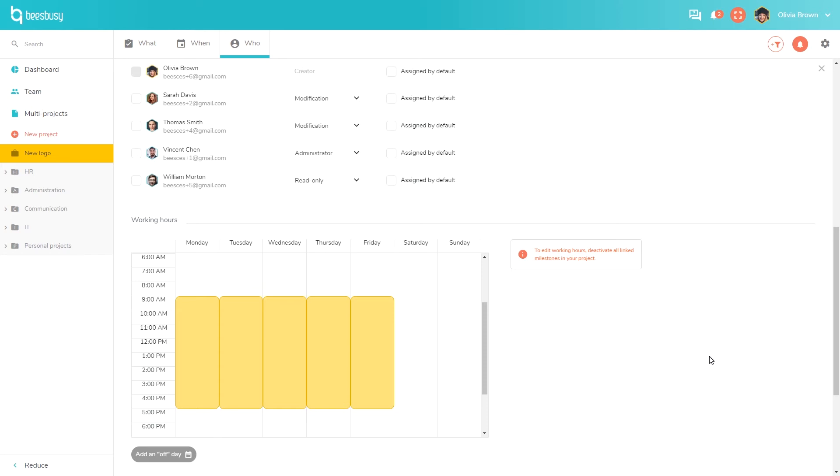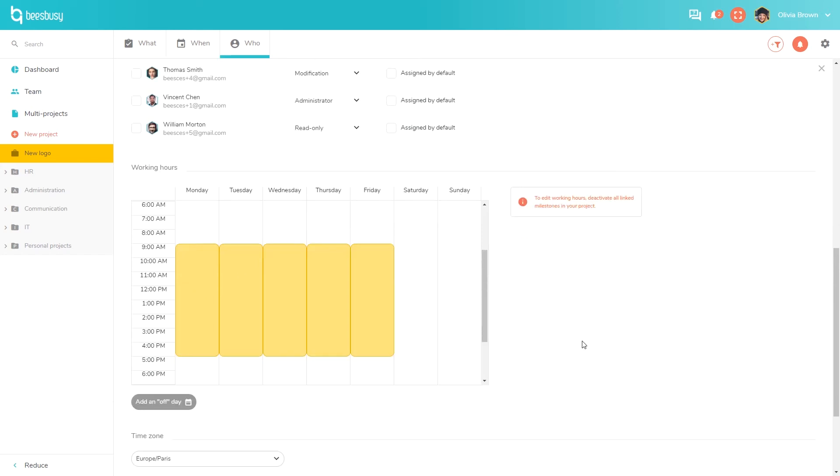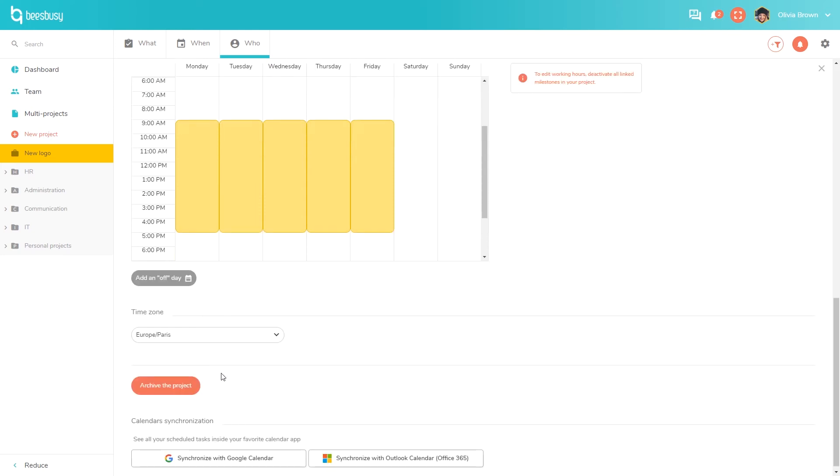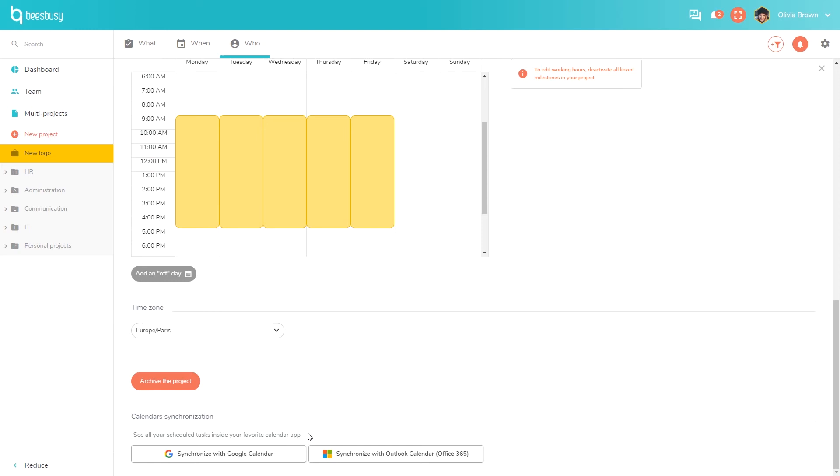If you want to go further in your project and time management, you can set working hours. For example, if you set Wednesday as a day off and then if you plan a task with a duration of five days starting on a Monday, it will end on the following Monday. You can also add holidays. You can duplicate projects, as I mentioned earlier. It is very useful if you want to create a template and then duplicate it and share it with your team. In that case, you can archive the template project that you want to keep for future reference. You can also synchronize the tasks of a project with your Google Calendar or Outlook Calendar with Office 365.